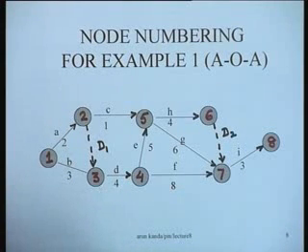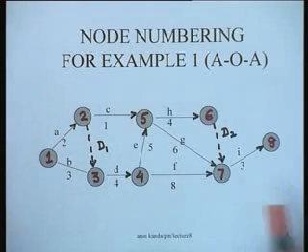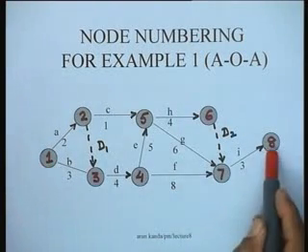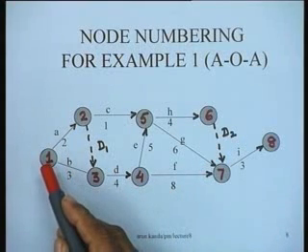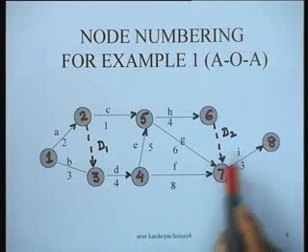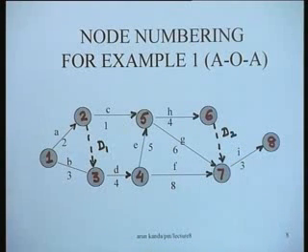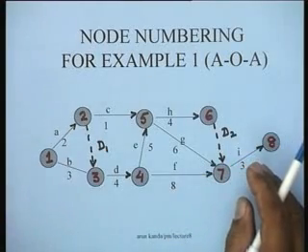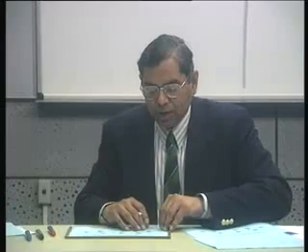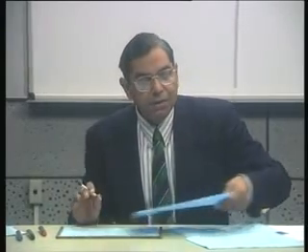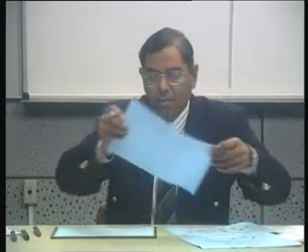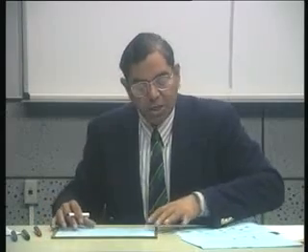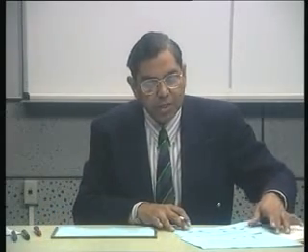Now if you look at this particular network, it has a single source and a single sink, and what we are interested in finding out is how to find the critical path in this project. As I indicated a minute ago, determination of the critical path can be done by enumeration of all the paths. So let us take this network and see if we could determine the critical path by path enumeration. The path enumeration can be accomplished by using a tree-like structure.